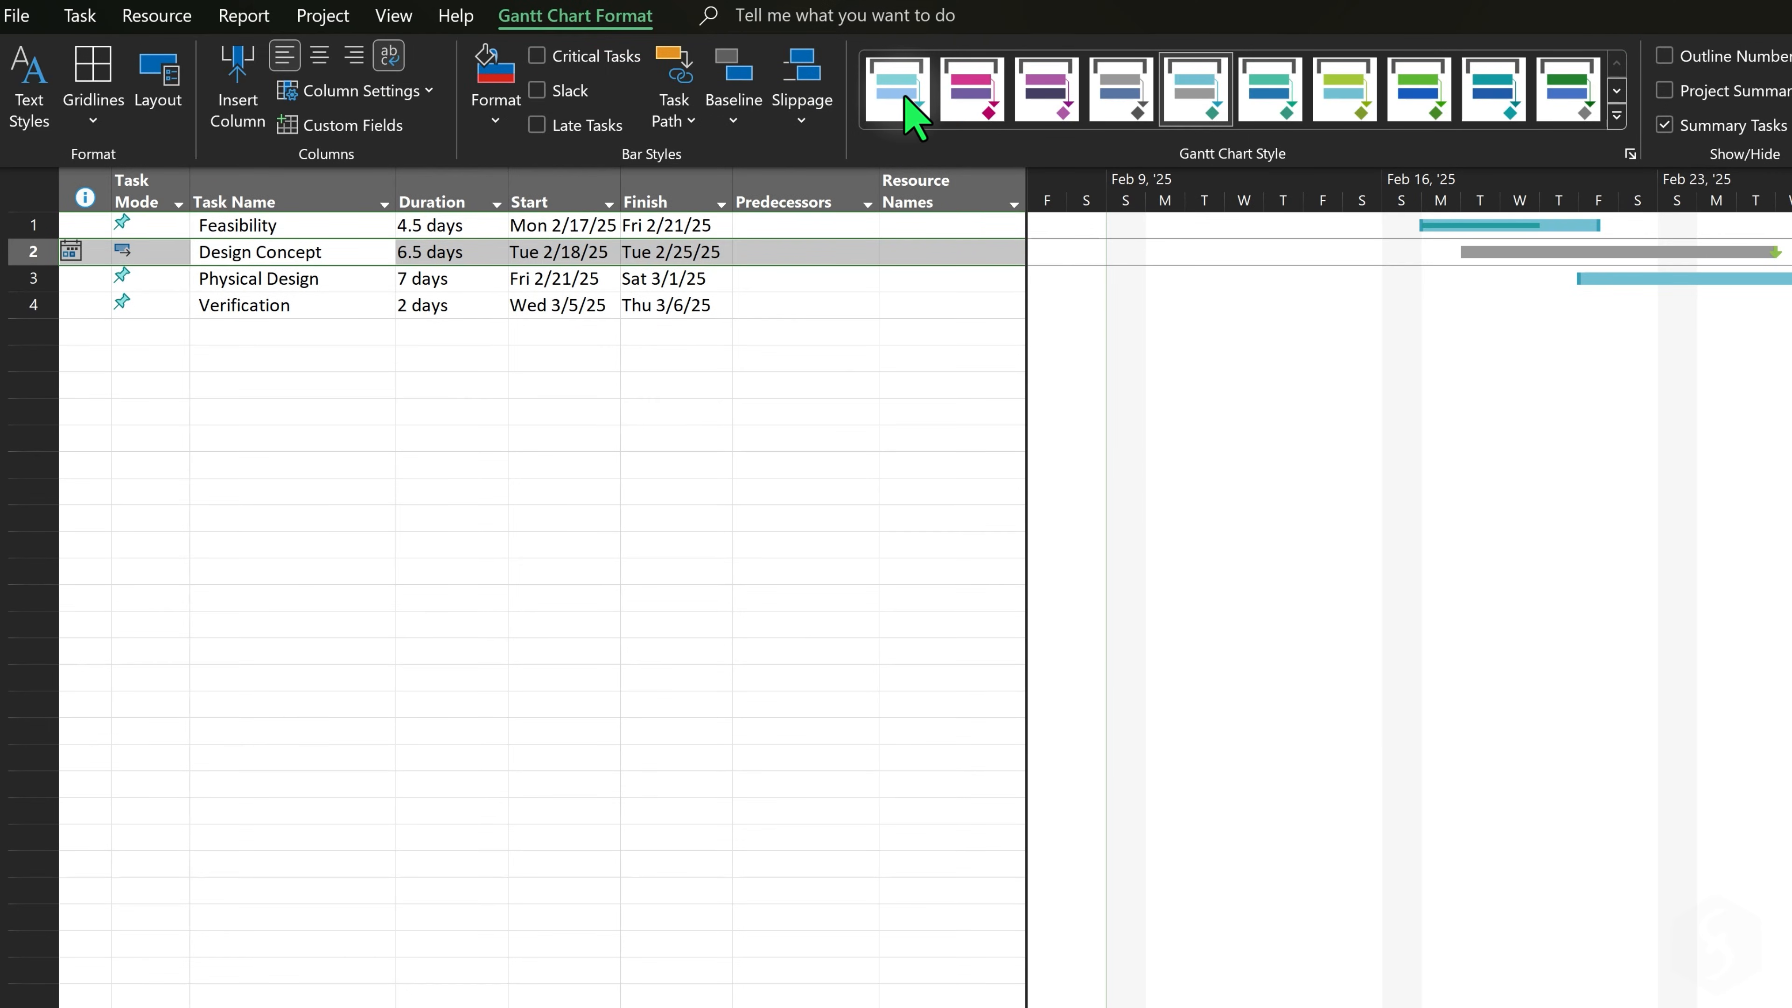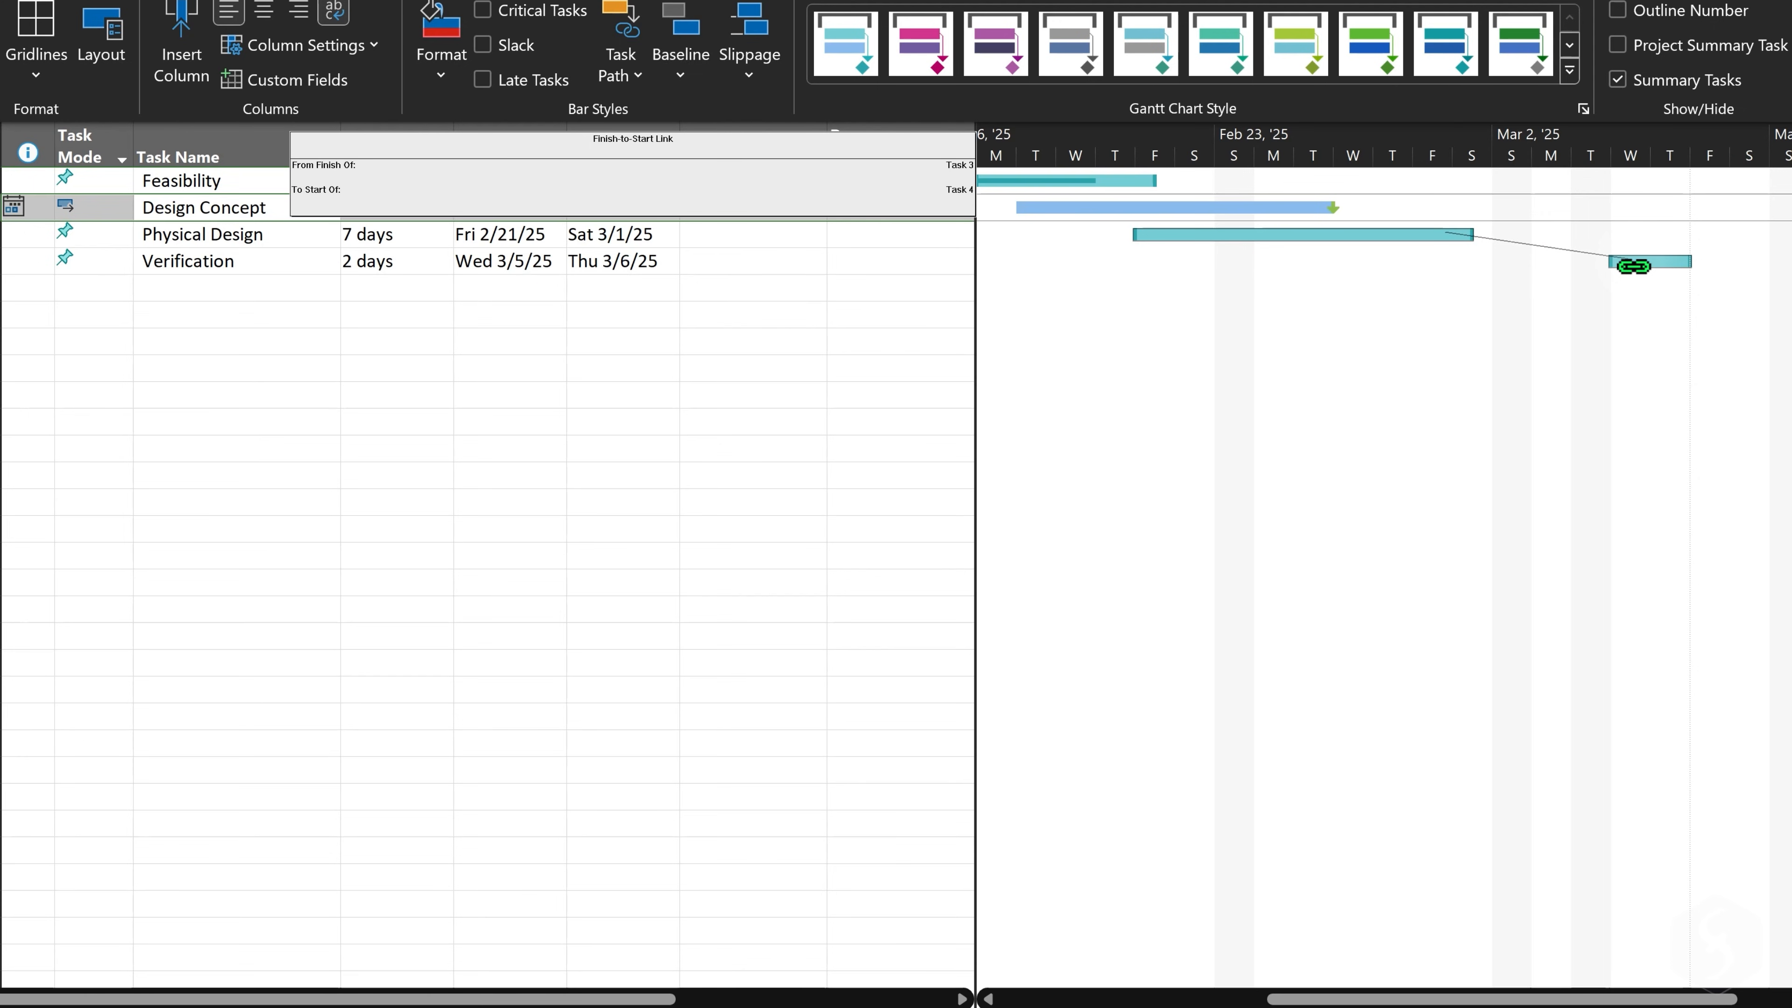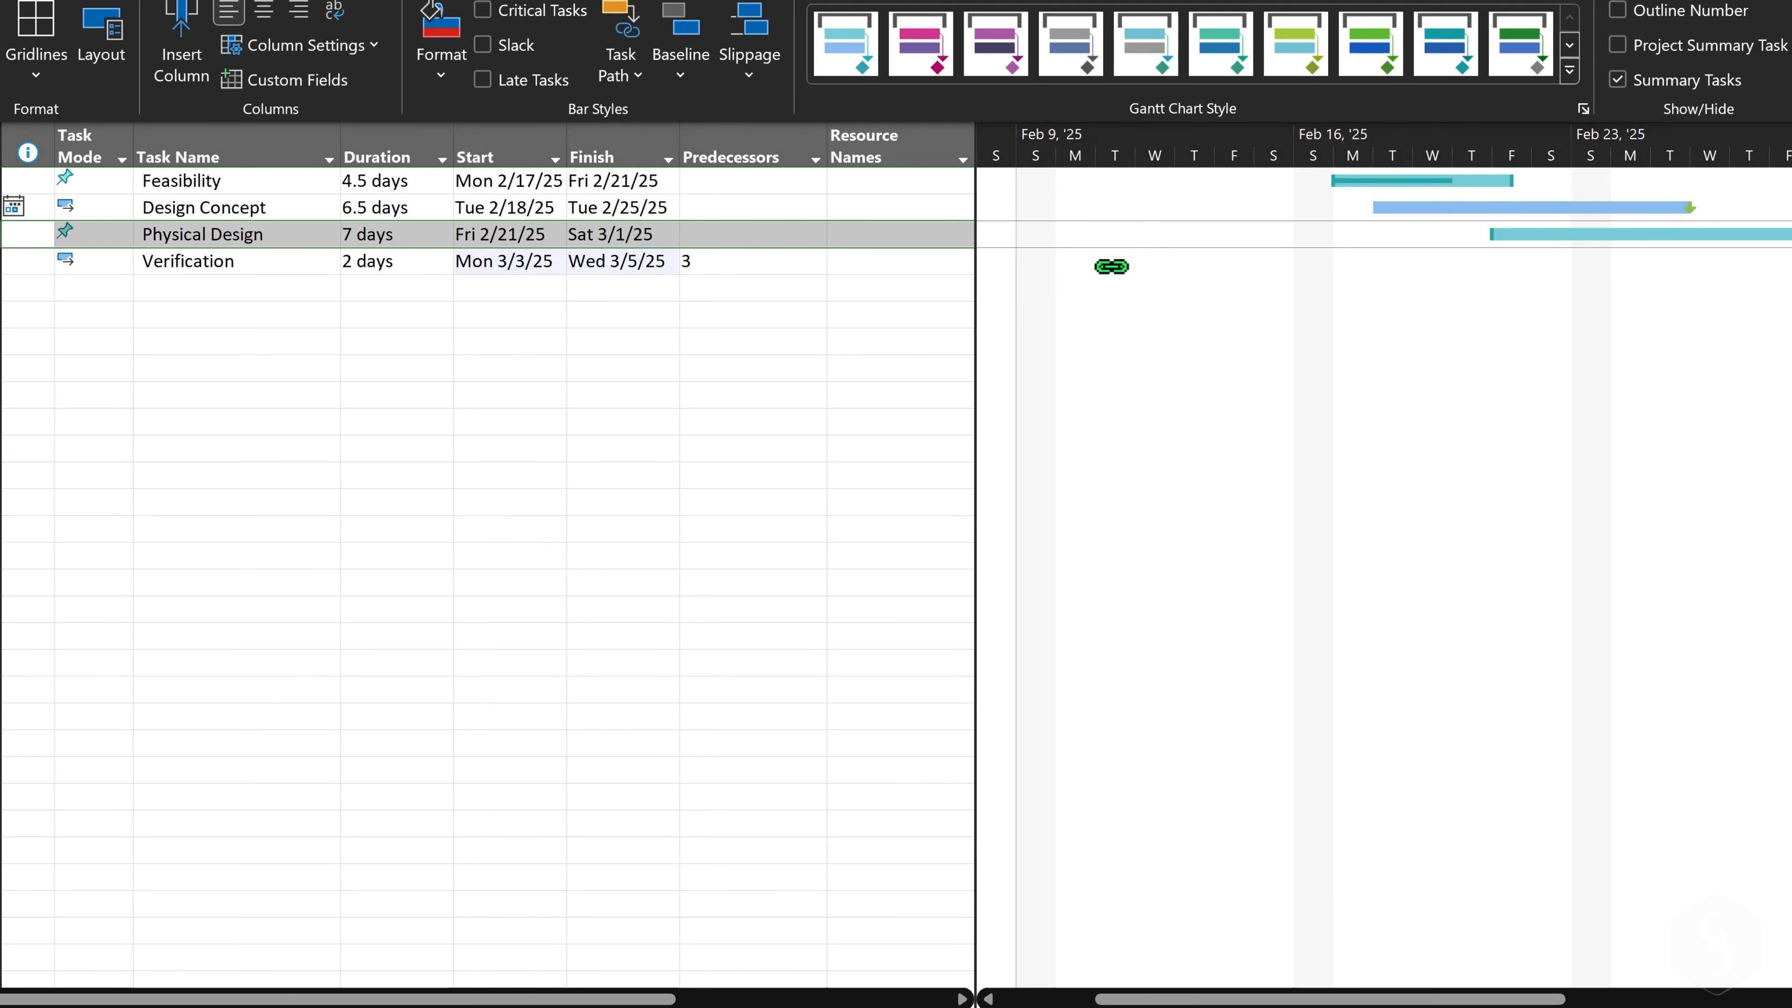You can also add link dependencies between tasks. To create a link, click and drag vertically from one task to another. When you release the click on the second task, a finish to start link is made, meaning that the second task starts when the first one, called Predecessor, is completed. As you do this, the second task may be anticipated to cover the time gap between the two.